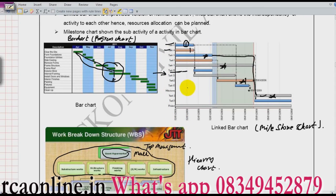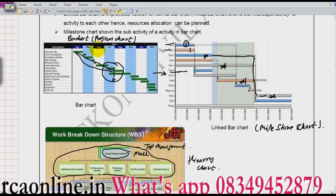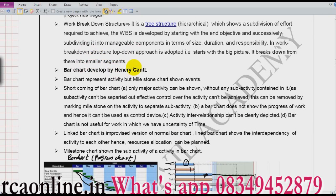Whenever a minister, CEO, or board member comes to a site, we usually show them the bar chart, linked bar chart, or work breakdown structure, as these are easily understood — concise and precise. But for day-to-day activity we cannot use these three charts, because one network can have thousands of small activities. These three charts are used by top management only to understand or review the project. Bar charts were developed by Henry Gantt, and work breakdown structure is a hierarchical T-structure.